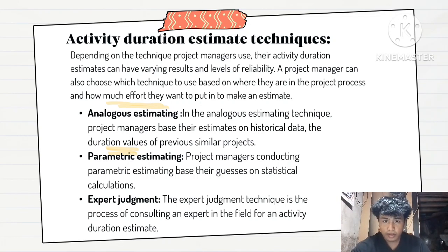So here are the techniques. Analogous estimating: in the analogous estimating technique, project managers base their estimates on historical data, the duration values of previous similar projects.